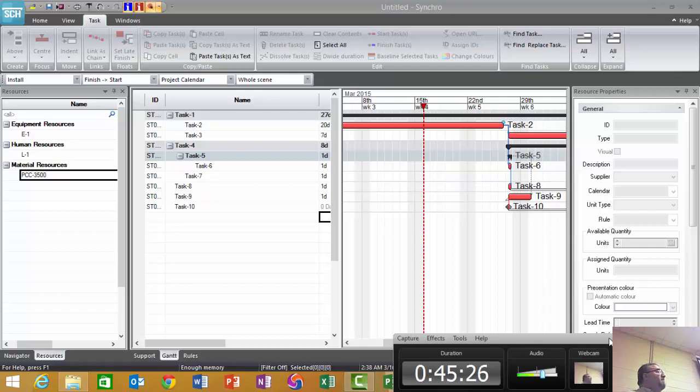So you can put in a milestone for your very first activity called Notice to Proceed, and that will not have a predecessor. And you can put in a milestone at the very end, which will act as your last activity. What could it be? Occupancy, or it could be substantial completion. Only thing about that is there's punch lists even after that, but that's okay. Substantial completion's fine. 2 milestones. One doesn't have a predecessor, one doesn't have a successor, but everything else in between needs to have one.